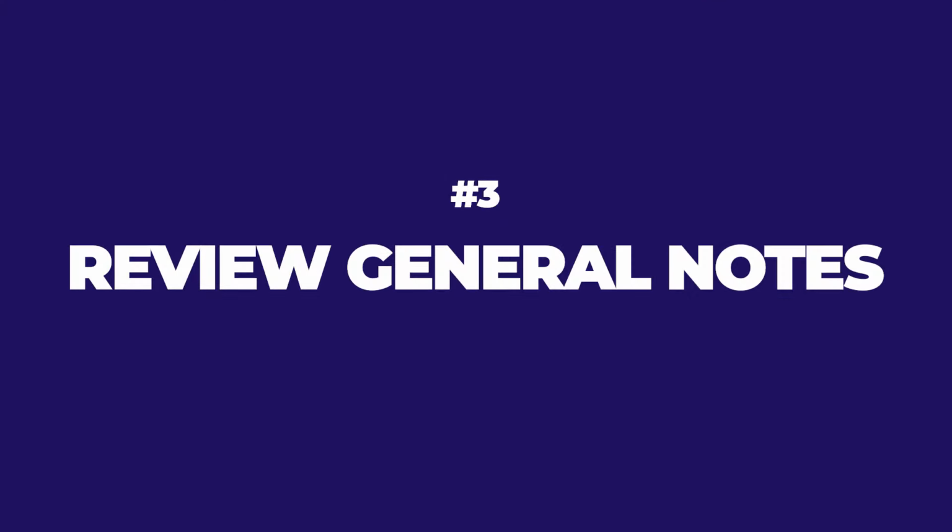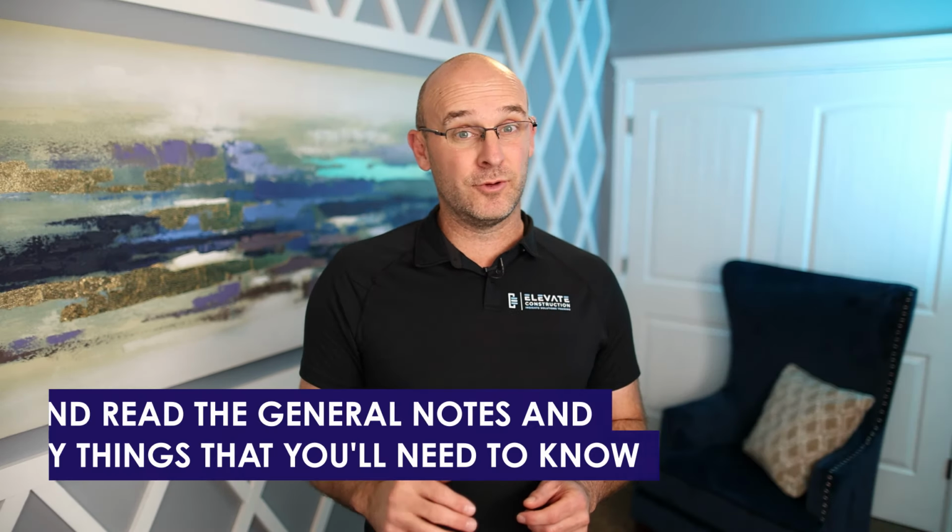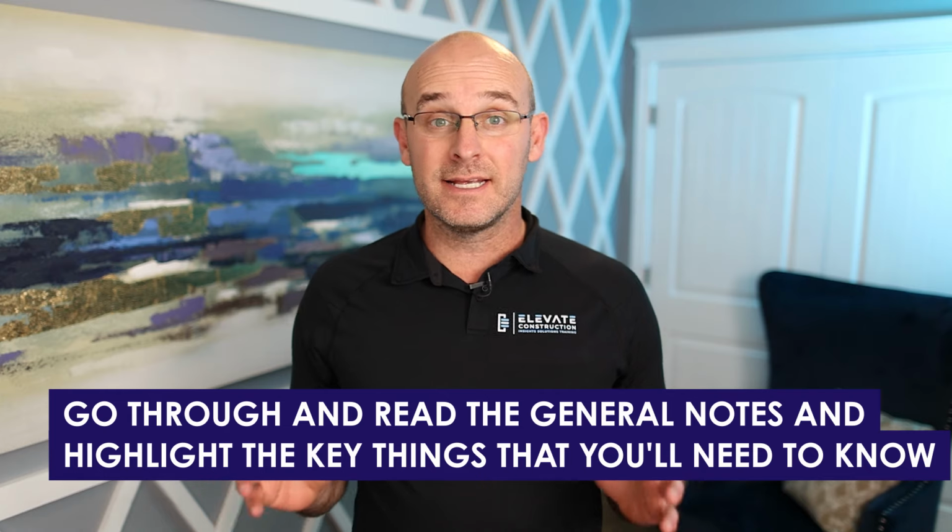Number three, go through the typical details and the general notes. It's super boring, but I recommend you go through the general notes and read them and highlight the key things that you'll need to know when you're reading the rest of the drawings. Some things that I typically find in there are provisions for how long you have to wait to apply waterproofing after you strip formwork. That can be a huge consideration when it comes to scheduling, especially in the foundations and with the basement.